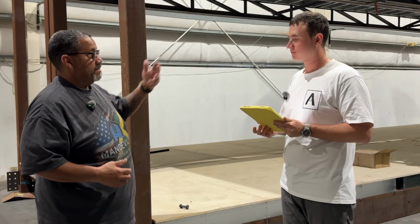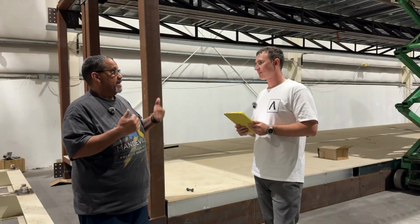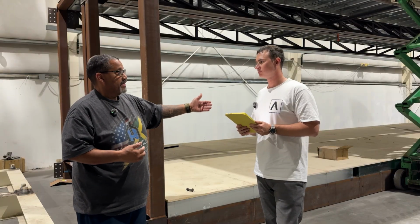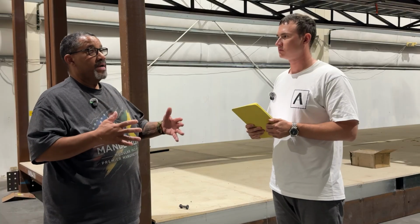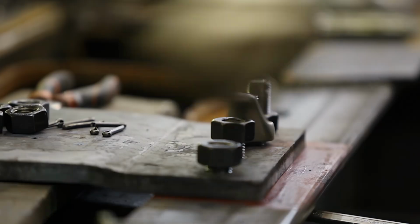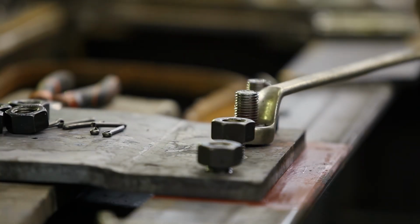Our requirement in our production is there's a day to frame. It moves down to MEP. So we'll have our electrical guys, our plumbing guys get on it. And then from that time, it then transitions down to the next station. So each of these units stay in each station a day, the most a day and a half, if we have to make some changes or corrections, because we QA, QC every step of the way. So if something is installed that we don't like, or as we're testing each part and component, we see something's wrong, we'll fix it. We just won't push it down the line. So that may inherently delay us like half a day or whatever it takes.